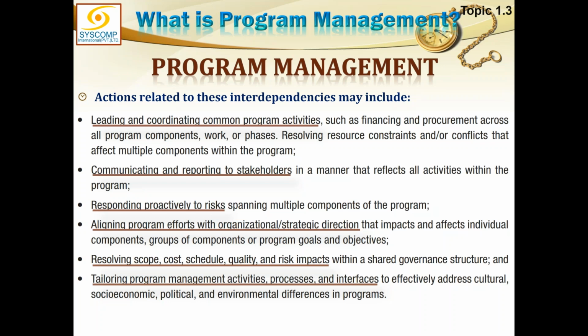So this becomes the program activity then. So such a line has to be drawn. What risks have to be dealt with by the projects or the subprograms, and what have to be escalated to the program manager. So those risks at the program level must also be defined.